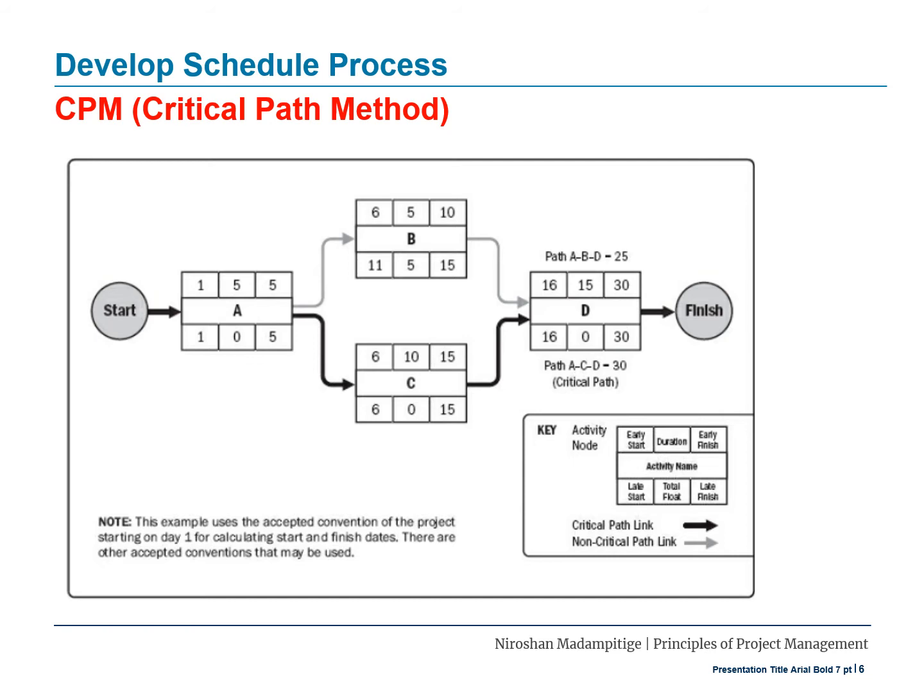Schedule networks may have multiple near-critical paths. Many software packages allow the user to define the parameters used to determine the critical paths. Adjustments to activity durations when more resources or less scope can be arranged, logical relationships, leads and lags, or other schedule constraints may be necessary to produce network paths with a zero or positive total float.